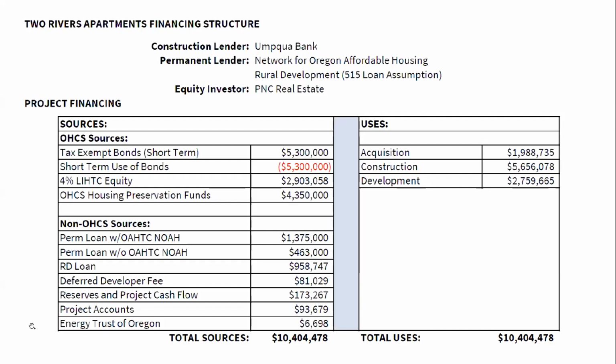And we're one of the few developers that really tackle the RD projects, because the RD process does take some time, and you've got to have the patience to do this. This project took 8 months to close from the time we submitted the application to RD to closing.